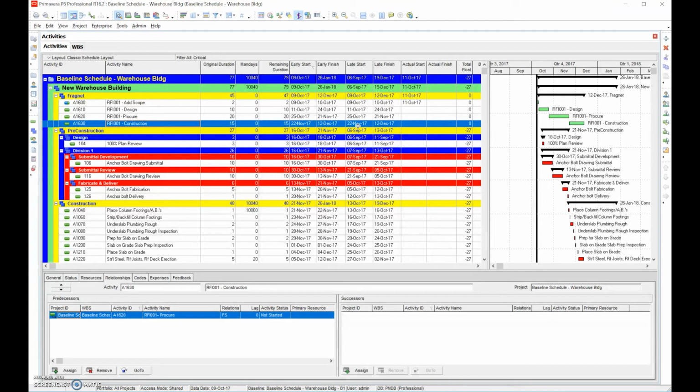You're not entitled to additional time if there's a concurrent delay, and it's just kind of being fair. I have a delay, you have a delay. Well, if we both have a delay, nobody's given anything. Okay, so that's a key point.